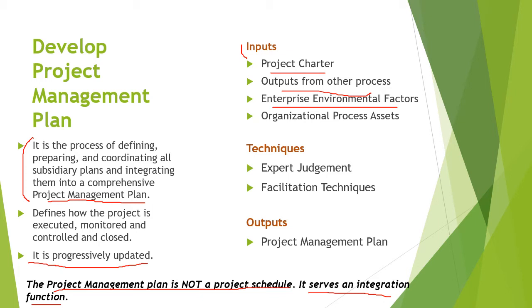Next, what are the organizational process assets that can influence developing the project management plan? A few examples can be any guidelines or work instructions in the organization, any project management template, any change control procedures, and project files from previous similar projects, if any are available. These are a few examples of organizational process assets.